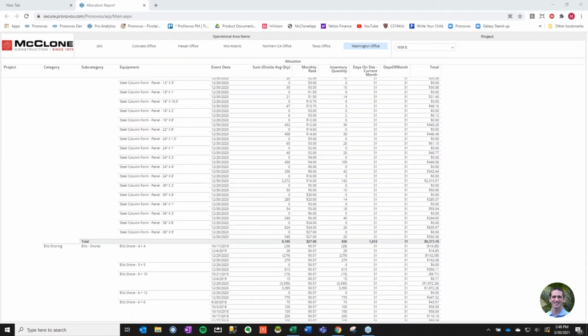Hey, you need to have 3 days. You need 3 days before you actually hit the OK button when you need that to when it hits the job site. And we can take a look at that information now. You can go back, and for every transaction, we now have a measurable KPI that allows us to say, are we being efficient in our operations? Because as soon as we have all these last minute trucks, we are not efficient. That's just the way that it goes.